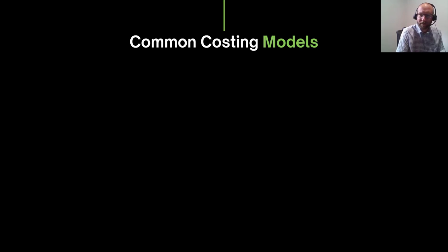From least to most accurate, common methods include folks that don't cost the roads. So with this group, road costs usually make up a small portion of their total costs. Their margin is so good they don't worry about it, or they don't know where to start to apply another method to come up with reasonable numbers. Then there's those who guess. So no analytical method, but just come up with a number based on previous projects and a gut feeling.